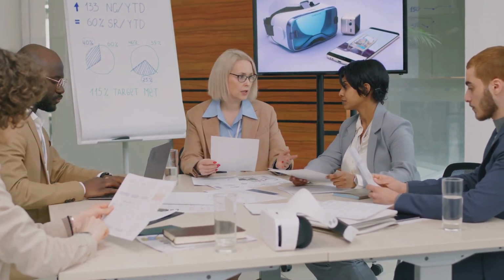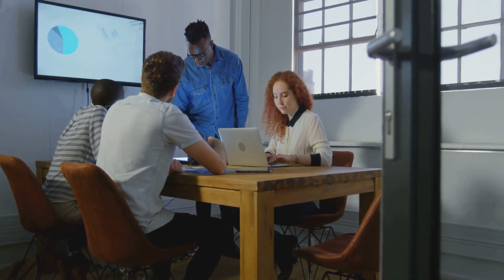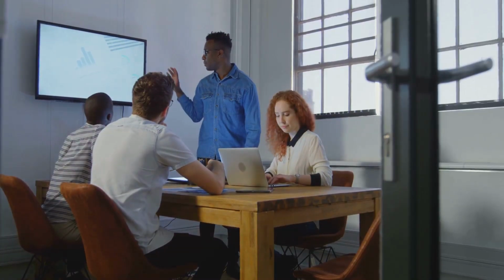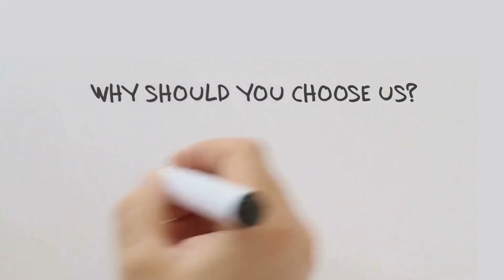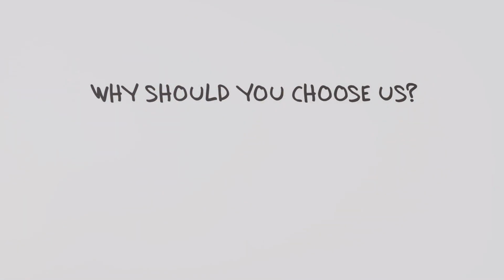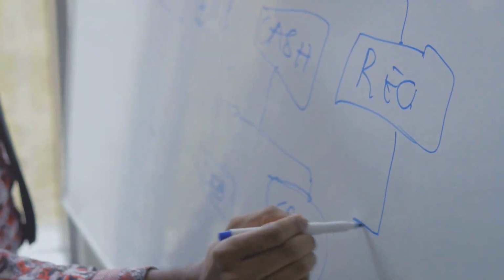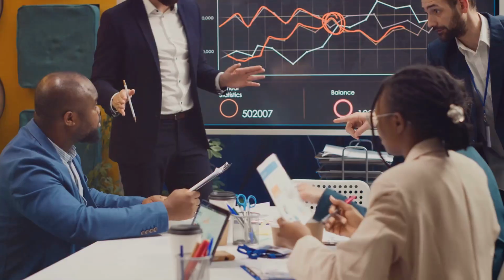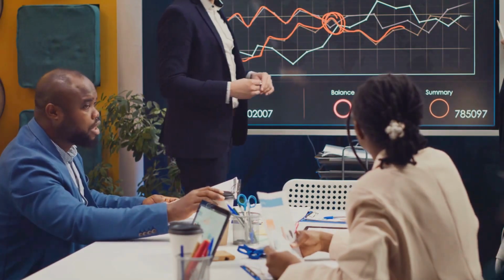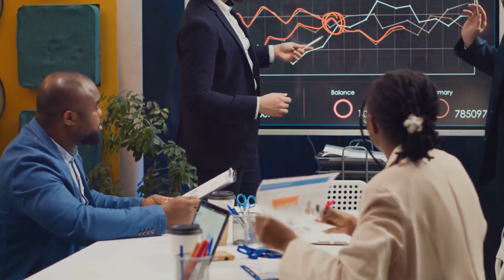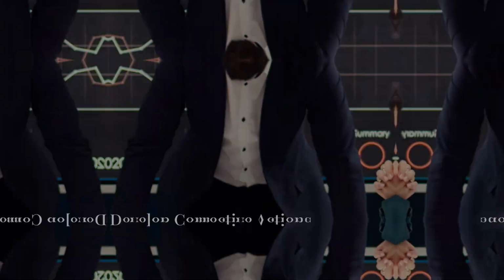The fifth step is to determine the root cause. This is the most critical stage of the process, where the team digs deeper into the analysis. The 5 whys technique is a popular tool here. By asking why repeatedly, the team moves from surface-level explanations to the true underlying issue. For instance, if a project was delayed, asking why multiple times might reveal that unclear communication of requirements was the real cause, not just a scheduling error.